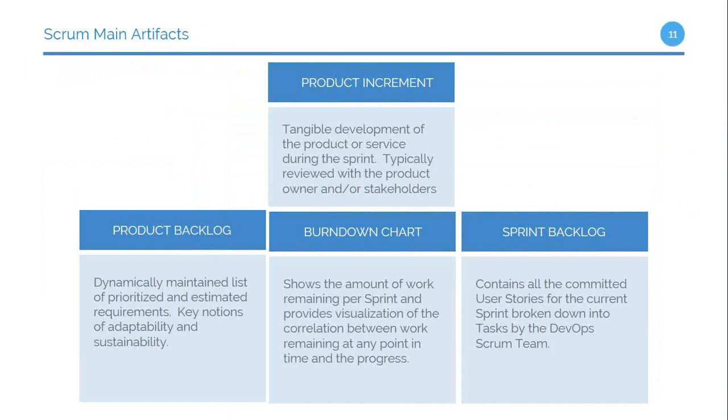So here, this idea that you don't really know when you're going to get done, well, you cannot know everything that's going to get done. You cannot know the entire timeline you have. You don't have to know every single task, but you should be able to take your product backlog, run it through planning poker estimation, and be able to tell me, based on the size of the team and the current velocity estimates you have, how many more sprints is this going to take?